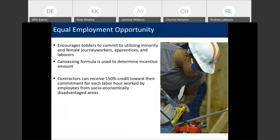So, equal employment opportunity. This incentive is in municipal code section 2-92-390, and it applies to construction contracts that are over $100,000. Historically, minorities and women have not had as much opportunity to work on construction projects, and it's important for the city to see those numbers increase for city-funded work. Therefore, we have goals for all city-funded construction projects over $100,000 for certain percentages to be performed by minority and female journey workers, apprentices and laborers. When completing your bid, you're allowed to propose what commitments you're going to make to hire female and minority journey workers, apprentices and laborers. The city has goals, but they're not requirements, so it's up to the contractor to propose what participation they're willing to commit to.